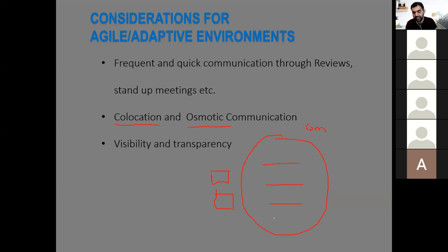If a team member is stuck somewhere, as work in progress is very visible, very transparent with the help of, for example, information radiators that are hung in the commons, where everybody can see what is in the product backlog and who is working on what, they can clearly see that one team member is working on one task, another one is working on another task. If someone is working on the same task for maybe more than 2 or 3 days, they can talk with each other to see what the problem is. If you're stuck somewhere, do you need any type of help, and so forth.